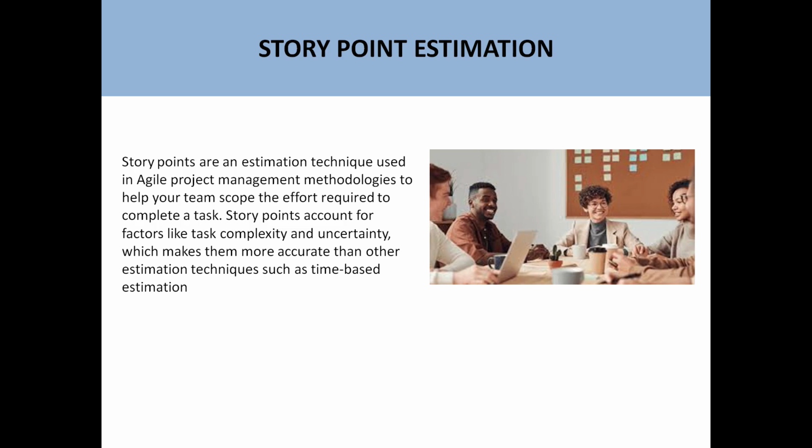Now what is a story here? Story is basically called a user story. User story means a functional requirement of a customer. For example, if you are implementing a mobile e-commerce solution and you want the customer to be able to do the payment through the credit card on the e-commerce store, this is a user story. Customer can select a product, it is a user story. Customer can add a product in a basket and go through the checkout process, so this is a user story.